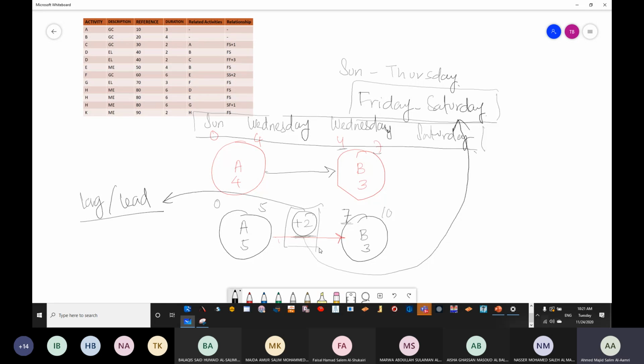You will see that your plan is for working and non-working days alike. So you have considered working and non-working days, but in reality, you have only considered working days, because we are not going to work on the non-working days.